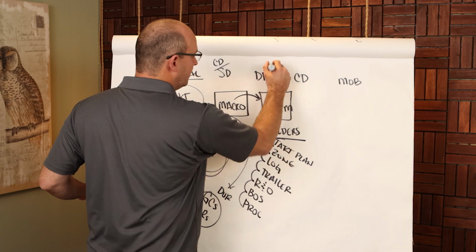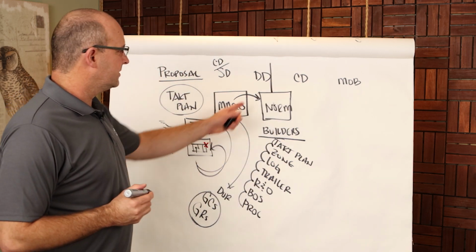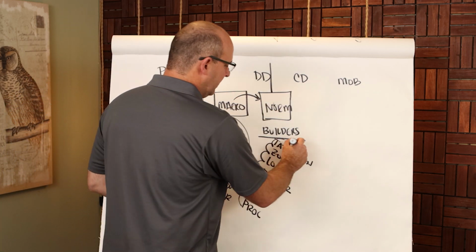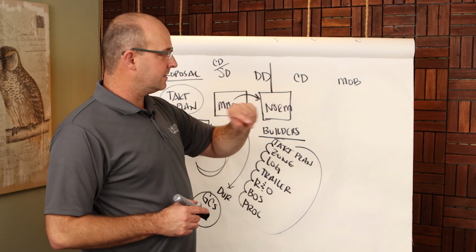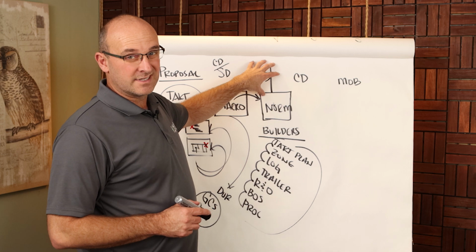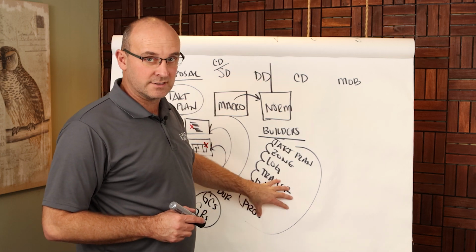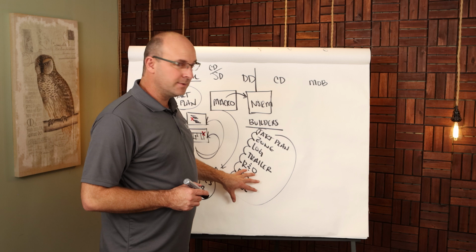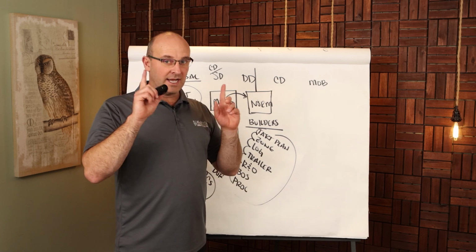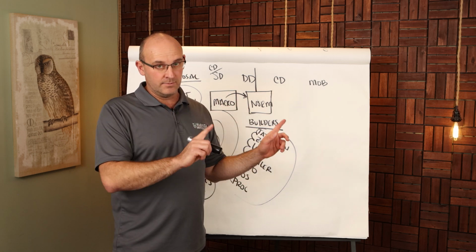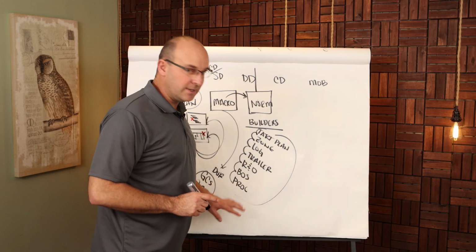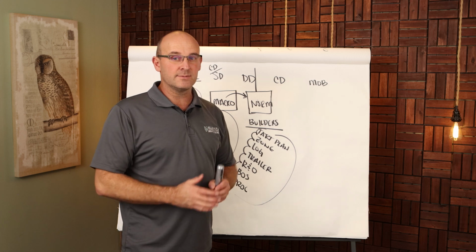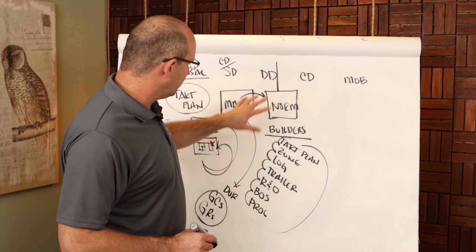So this is the time mid to 3/4 through design development, your norm level tech plan. This is going to make sure that you are able to, and this is key, I hope you're paying attention, work with the design team to select systems that enable the work packages, and it's going to bring in the builders, so it's a builder plan, which, as we've talked to you about before in books like How Big Things Get Done, is why projects win. When the builders plan the project, they iterate multiple times and they spend the time to actually plan it. So I'm hoping you love this.